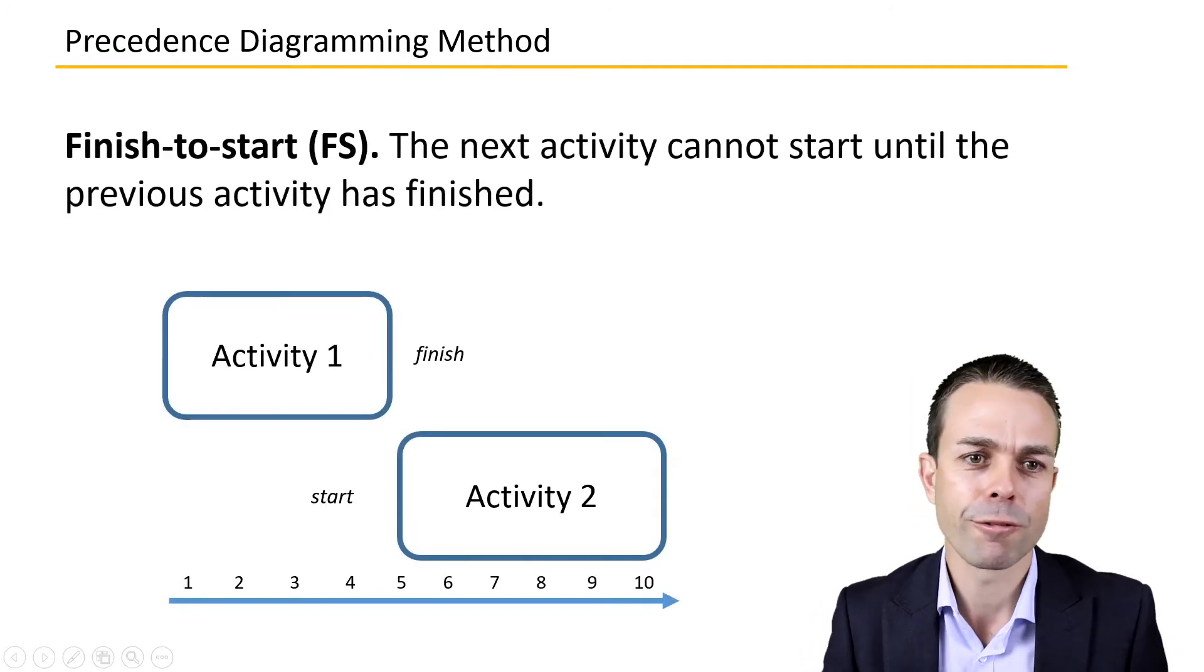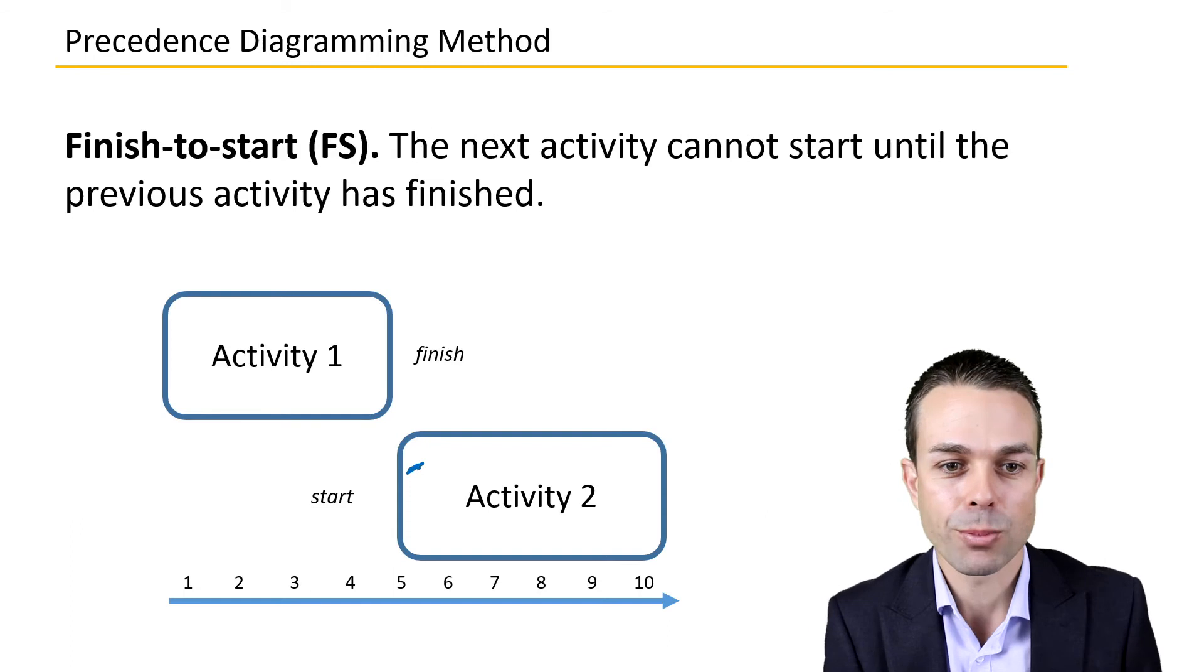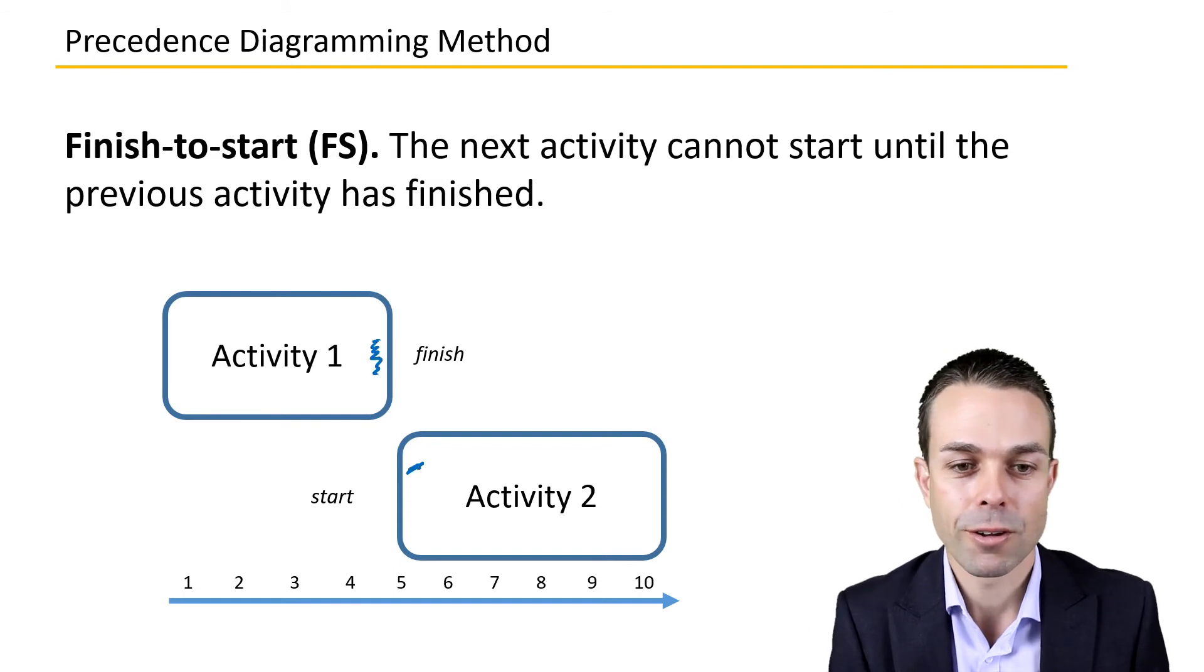The first one is finish-to-start, where the next activity cannot start until the previous activity has finished.